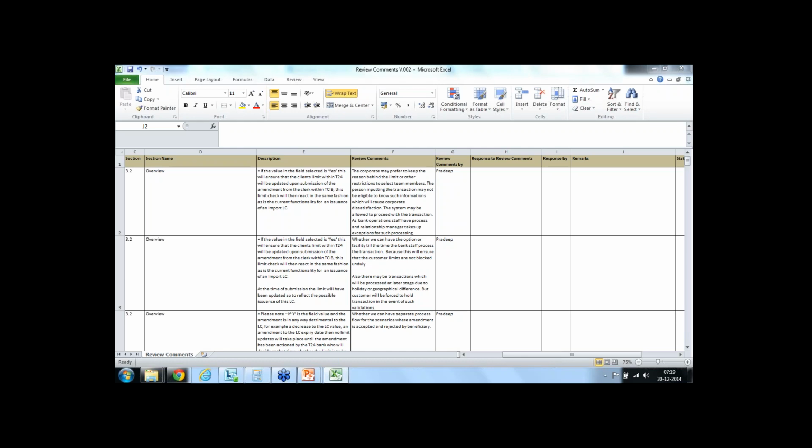In that system, all your stakeholders represent various components or units which your system is talking to. In that case, the changes happening at those various units are one of the dependencies, the standards followed by each unit are one of the dependencies, and probably the time of interactions or the time of availability is one of the dependencies.